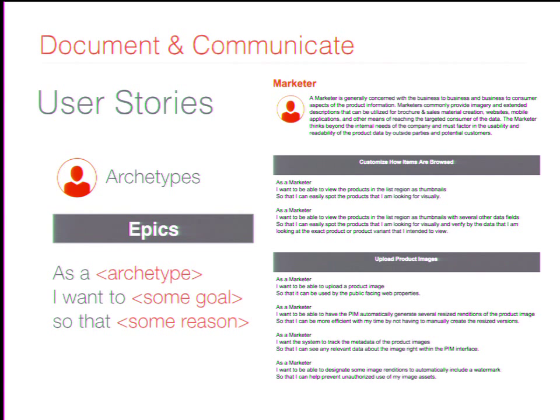One thing to keep in mind as you write your user stories: write them for the audience that's going to read them. We played around for a while doing Gherkin, because we do Behat at Metaltoad, and we realized that when we had to get approval from the people in the companies, they weren't actually reading the stories, because Gherkin was still not close enough to English. It still seemed a little nonsensical or whimsical to them, and so they would get partially down a few pages and just sort of zone out and not pay attention. Well, if they're not actually looking at the stories and approving them and moving forward, those stories are just for you. And that's missing the point. You want to make sure that whoever needs to read and approve these is going to read and approve them.